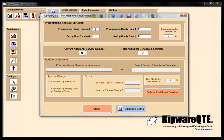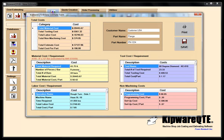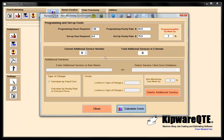I'm going to do some estimates for my programming time. It's a pretty simple part to program, so I'm going to give it about an hour and a half to program it. The programming hourly rate might be different from your machine rate — I'm going to put $45 an hour for programming. For setup, we've got setup time on the lathe — boring jaws, setting up tooling — plus the mill. I'm going to put four hours for setup for both the lathe and the mill at $75 an hour. If I calculate costs, you can see non-machining costs are now being put into the quote.